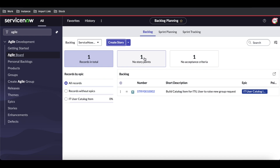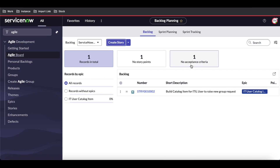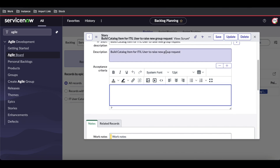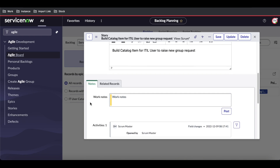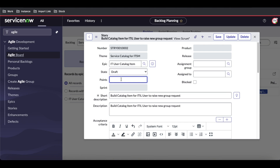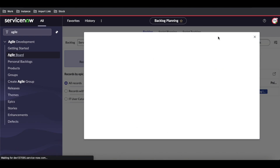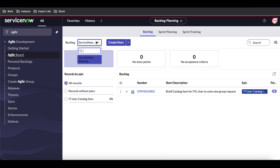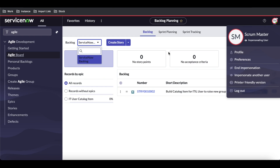You can see the story has no story points and no acceptance criteria, which is flagged. As a Scrum Master you can update those details — add acceptance criteria and define the story points. I'll set the points to five. Once saved, the warnings are gone. Similarly, we can create more epics and stories. The Scrum Master can only see the one backlog shared by the Product Owner.